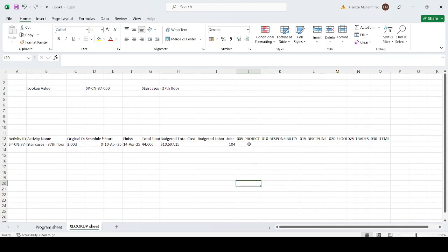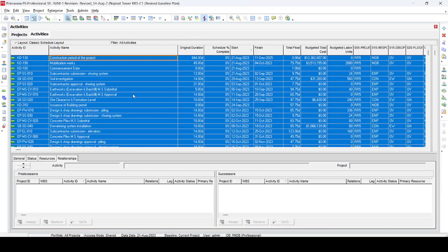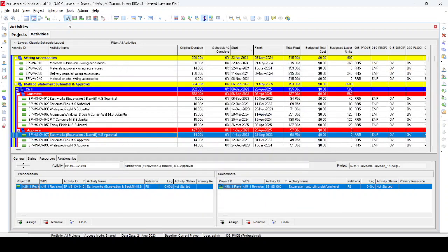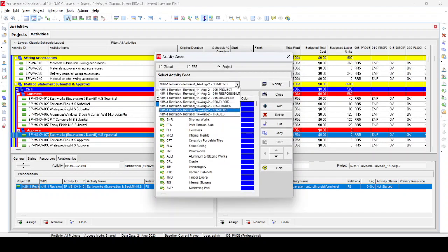We want to know what is the project code here, and first we determine what the project code is here, and based on this project code we put the value, what the project code values are. So now we will first add one more activity for the activity code, and then from the Primavera go to enterprise activity code, and then we select all codes one by one.